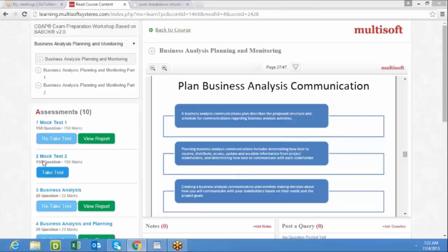You can assess this, for example, by taking a first warm-up session, or by a deeper analysis of a previous project. If any similar project was done, you can analyze that as well, to see who your stakeholders or key stakeholders were. So these are some ways, some tricks, to identify the key stakeholders.